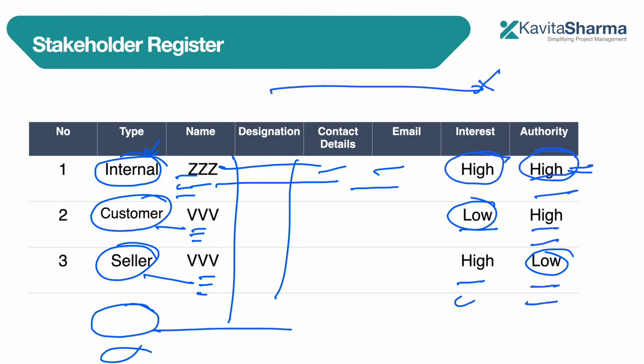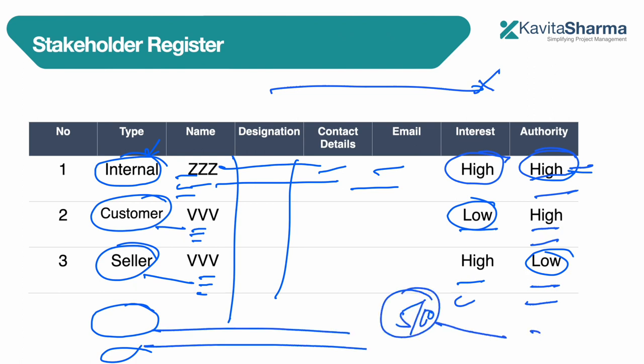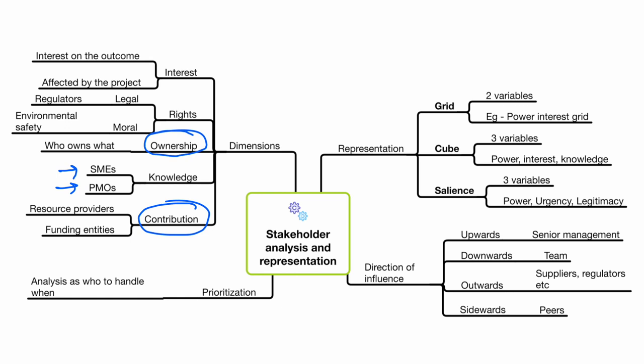The stakeholder register should not have just 5 or 10 names — it should have at least 20-25 names, even for a very small project. If a stakeholder request comes, who do you respond to first — the CIO's mail or your team member's request for data? That is prioritization.